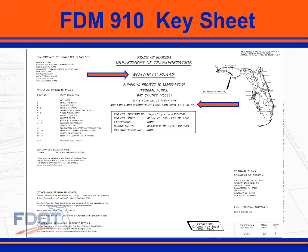Second, provide a description that includes the project type as shown in the current work program, such as resurface, add lanes and reconstruct, new bridge, etc. And include begin-end work limits using site features such as side roads, river crossing, or county line.